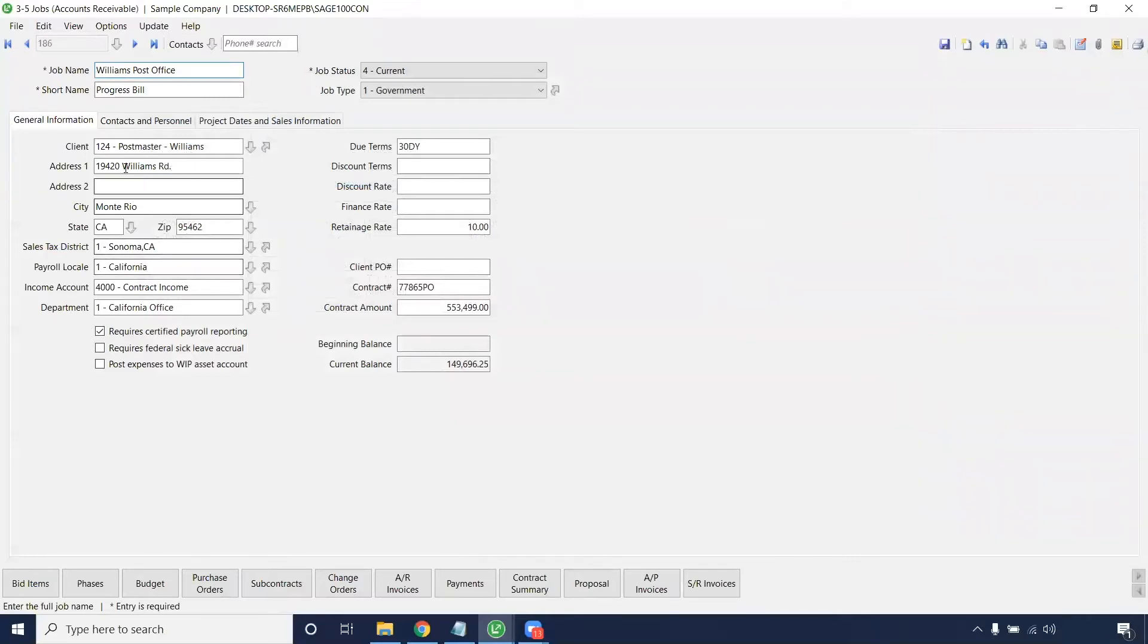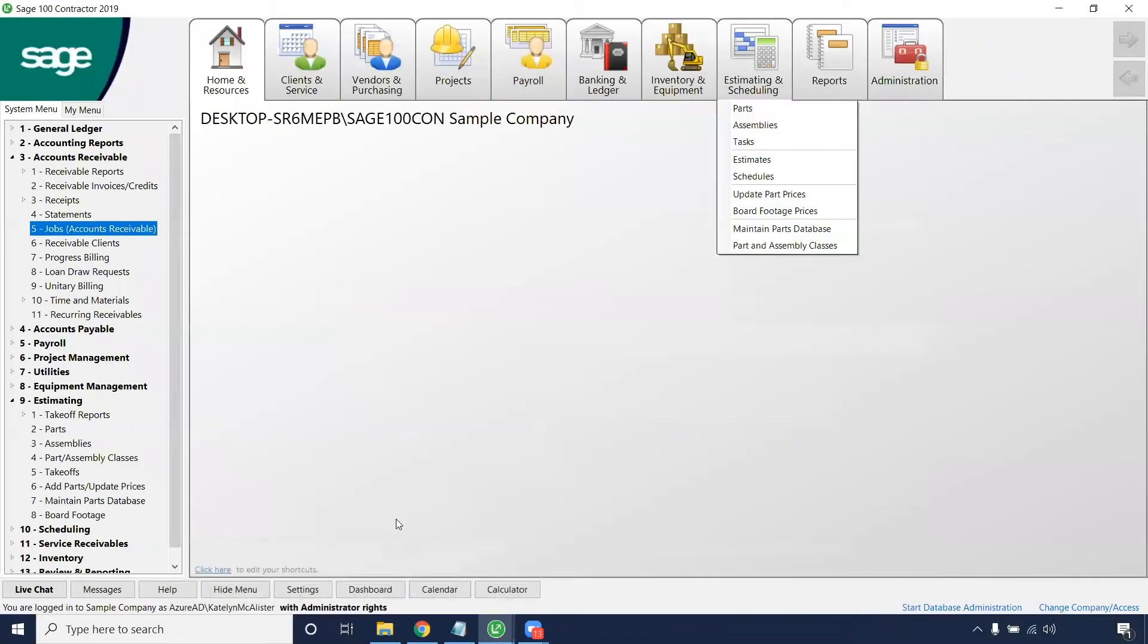Here, once you enter the address for this job, and you pre-populate the city and state, you'll be able to enter a sales tax district. If this is not set on this level, you will not be able to add it on the takeoff itself.